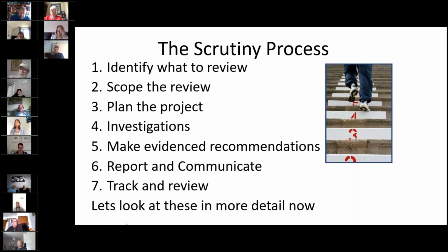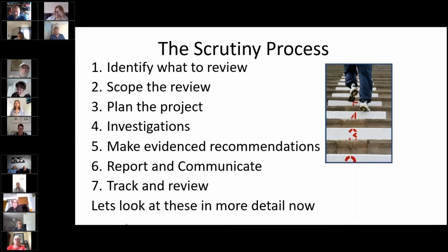How are you going to scope it? So what's in, what's out, what you're going to focus on, what you're going to put to one side maybe for another time. Thinking about then planning the project, who's going to do what, how long is it going to take, what are the actions that you need to put in place, what resources do you need. Then doing the investigations, then the recommendations, reporting what you found and telling people about it, and then looking at how you track and review the recommendations that you've made. So that's a suggestion from us.